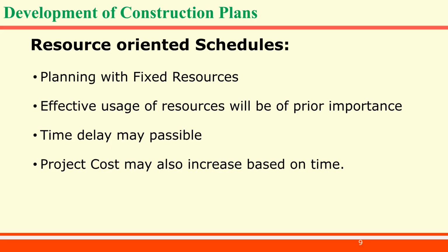However, because tasks have to wait for equipment or personnel to become free, project delays can occur, increasing overall indirect costs. Example: if only one concrete pump truck is available, foundation pouring for Section B must wait until Section A is completed. In conclusion, balancing time, costs, and resources is the core of construction planning.